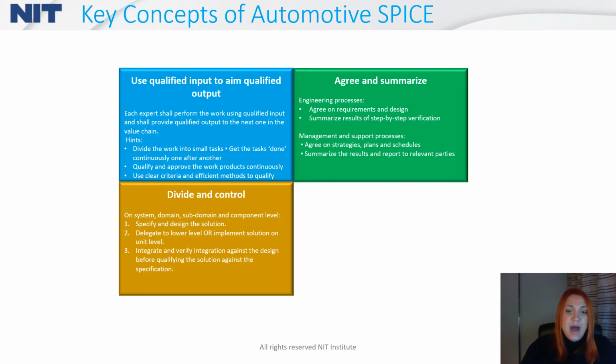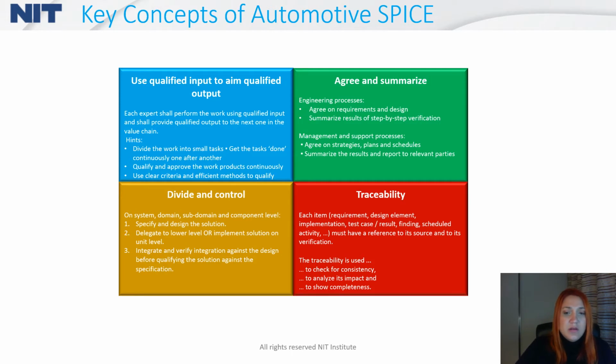And the last but not the least is the concept of traceability. Traceability means that each item, requirement, design element, implementation, test case, result, or finding must have a reference to its source and to its verification. Traceability is used to check for consistency, to analyze impact, and to show competencies.